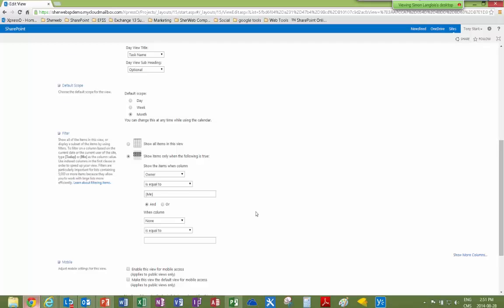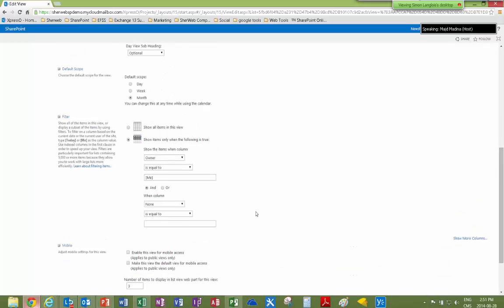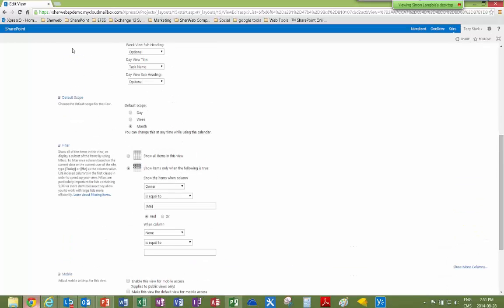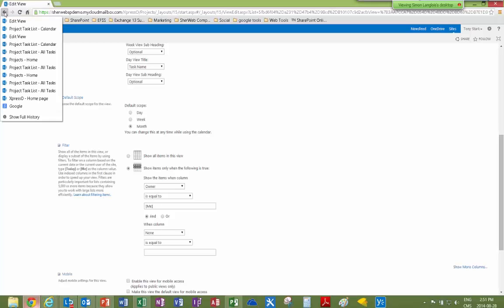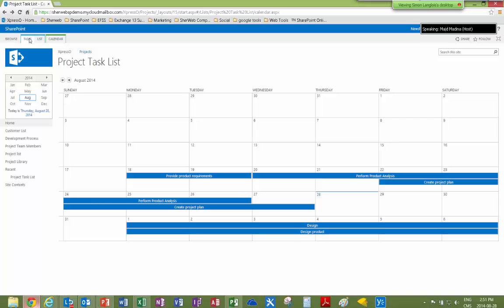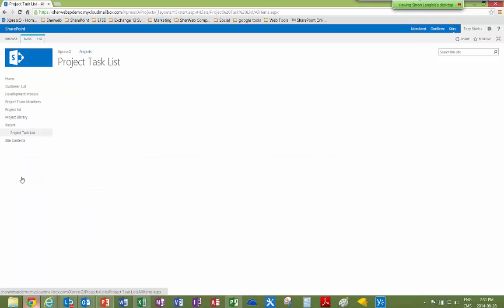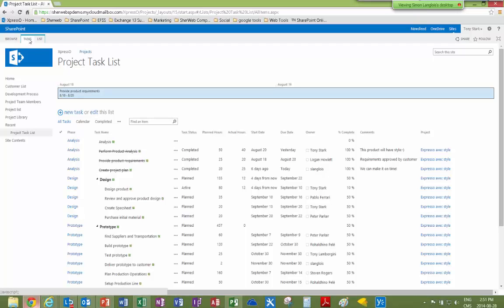Okay. Perfect. Any other? Well, yes, there's another from Vulcan saying, how can I sync from Project to SharePoint? There's a simple button, as we show. We go from your task list. Project can only be synced with the task list. So if you use a personalized or custom list, it will not work.